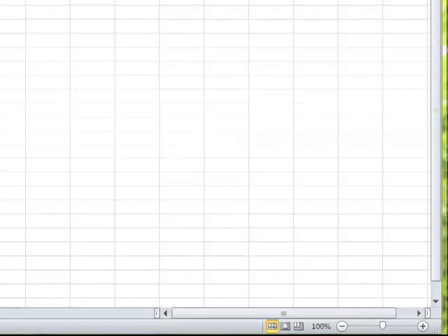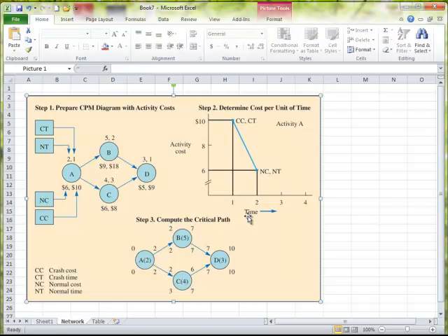And the drawing out of the book I'll provide here now. Here's the network drawing. This is the drawing out of the book, exactly out of the book, and I just took a screenshot of it and put it into another sheet here temporarily so we could talk about it a little bit. But you can see where this example is explaining the NT is your normal time, the CT is your crash time. And what they do is a network diagram and they annotate it so you can capture a lot of information this way. And they're showing the normal time and the crash time above it, and with each of those rates that you're getting things done in, how long it takes you to get anything done, you also have an associated normal cost with the normal time, and you have a crash cost associated with the crash time.